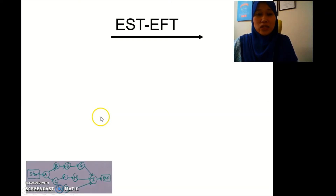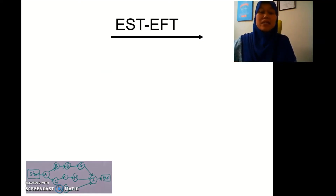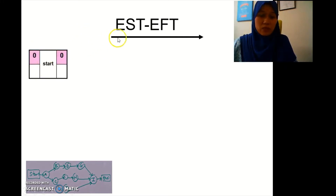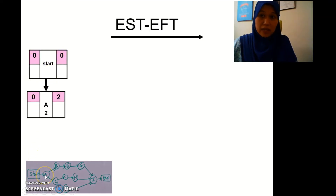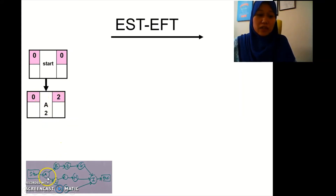When we get this sketch we need to do the network diagram, filling in the earliest start time and earliest finish time. We're going to go forward from left to right. Start is zero plus zero. Then we go to A — A's duration is two, so zero plus two is two.